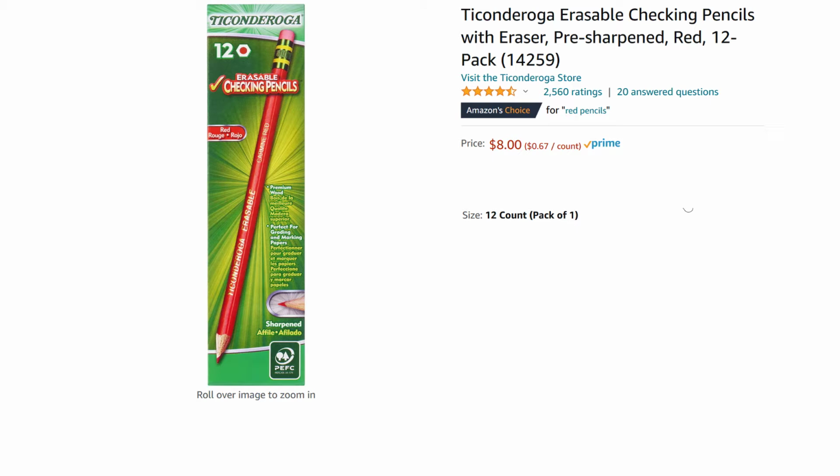When I complete a takeoff on a sheet in the drawings, I check off the sheet number to let myself know that that sheet is complete. You might be waiting on clarification or quotes to come in on specialty material and have several pages sitting incomplete. So it's a good idea to put a sticky note on these sheets and list the reason why they are not checked off so you can quickly remember to follow up on those items.